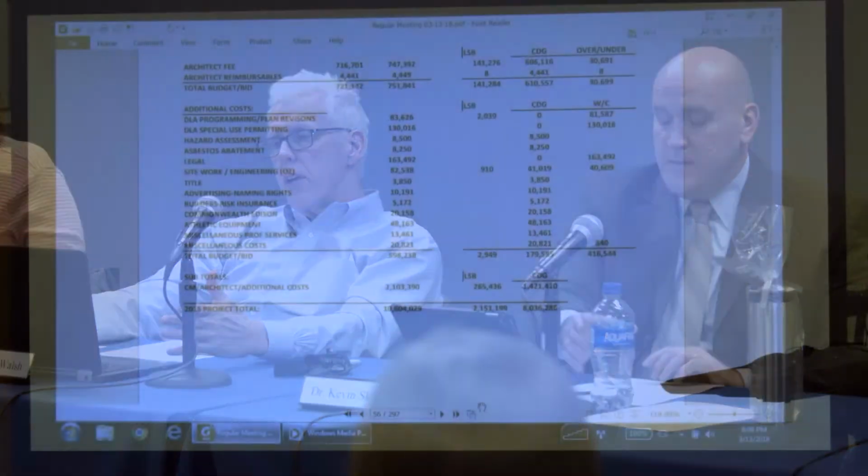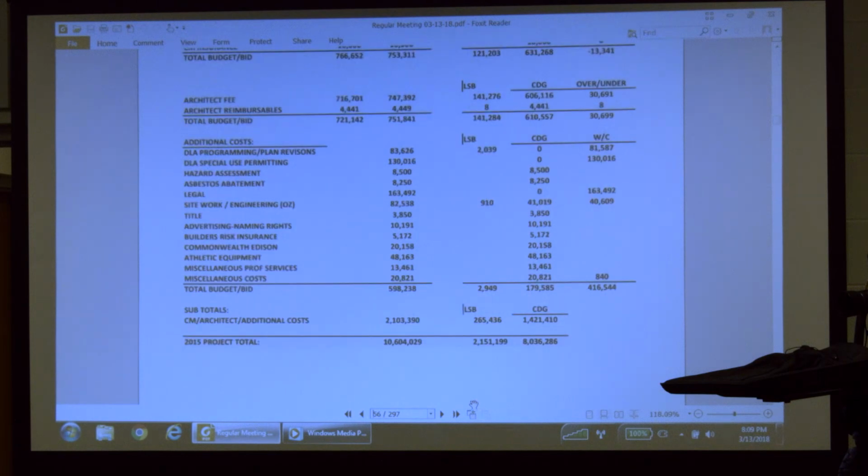If you look at page 56, on the bottom, the list of additional costs there, Kevin pretty much highlighted them. The design was good. Most of those had to do with the change of design either for the water system we required or because of the special lawsuit and the hearings we had to prepare for. The zoning board approved it 7-0. We had $163,000 in legal fees that we didn't anticipate, so it's unfortunate, but we still were within 1%. It's close to 1 or 2%. That's why we had to pay extra money.